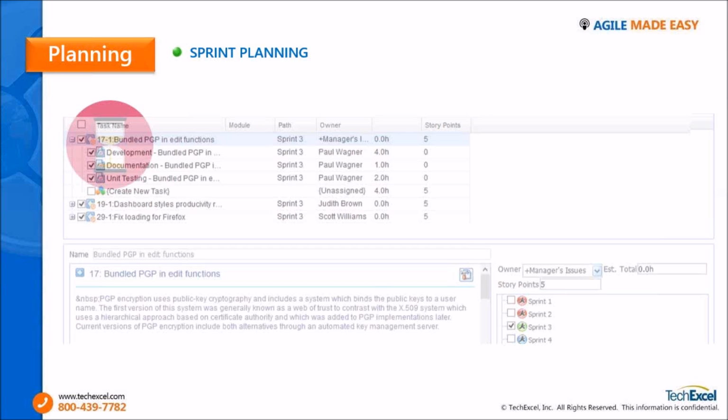Initially we started off with a 6-month release duration, but then we saw that some of our customers wanted a new set of features before the 6-month duration. And if there was any feedback or any changes required, they had to wait for another 6 months for the next release. So we decided to shorten our release cycles and make them about 3 to 4 months each. The biggest benefit that we gained is for our customers.